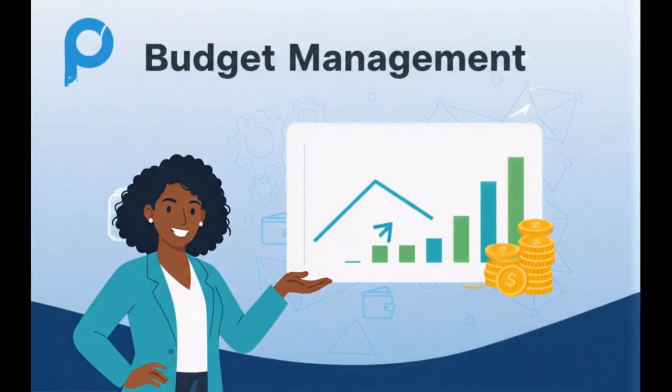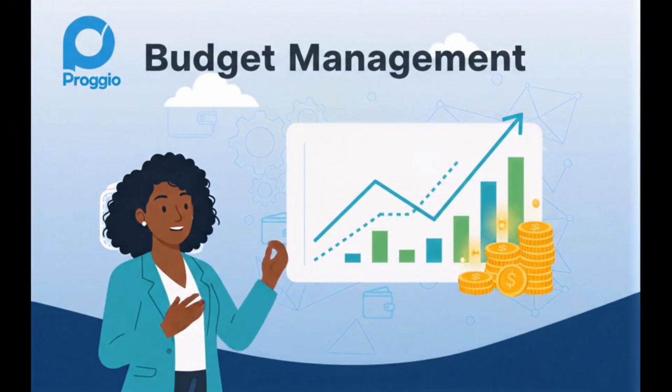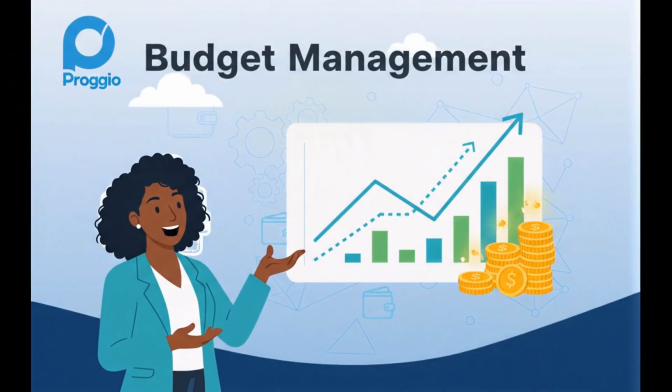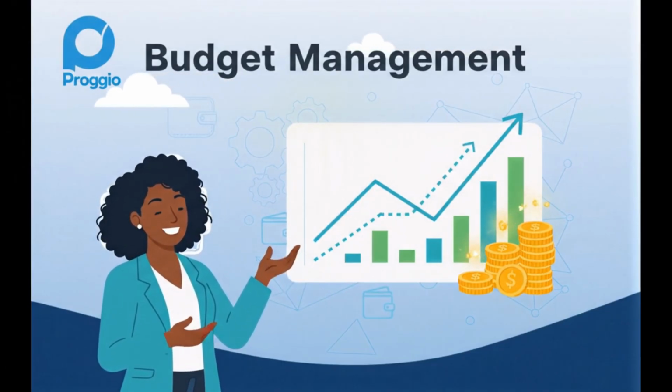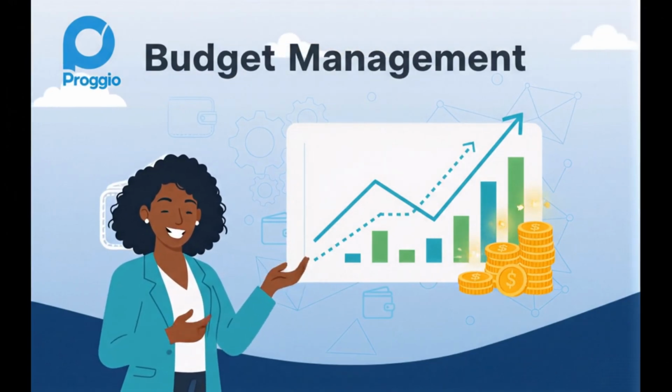That's it. Set up your budget items once. Assign them to tasks. Track planned versus actual. Enable auto-calculated labor to save time. And use Portfolio View to manage spending across multiple projects.